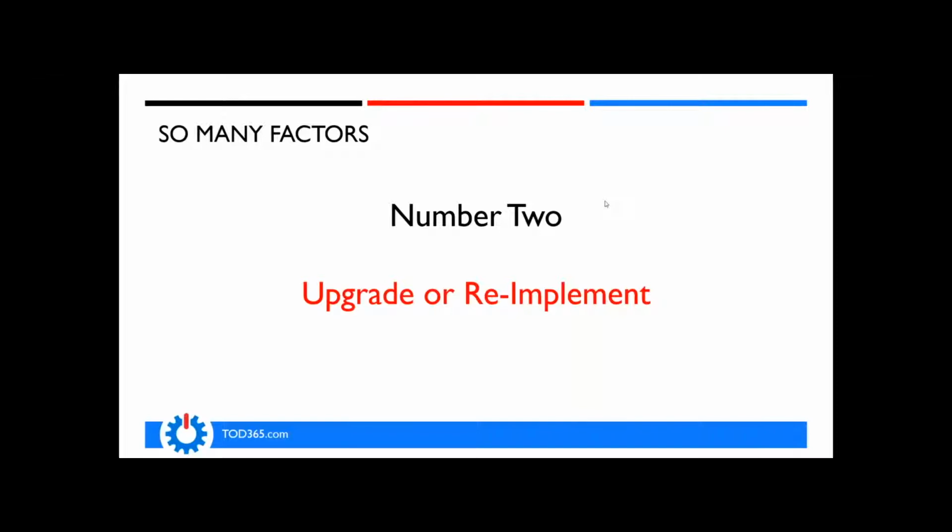And when we started looking at the detailed technical aspects of that upgrade, what we quickly found was that there's really no way that these guys could do an upgrade from a technical standpoint. Their modifications were so intrusive and had so broken their software that there was no logical way for us to do an upgrade. So we had to say, look, we've got to do a reimplementation. Interestingly enough, internally, the management team was not going to sign off on that.